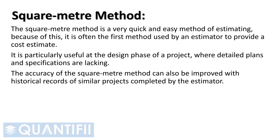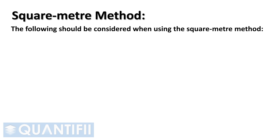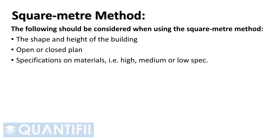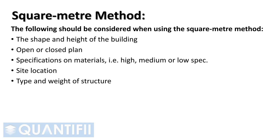The following should be considered when using the square meter method: the shape and height of the building; open or closed plan, which considers the amount of walls built internally; specifications on materials — that is, high, medium, or low specifications; site location, for example if it is near or far from supply sources, or if the site is difficult to access; and if the structure is built using steel, timber, or brick and mortar.